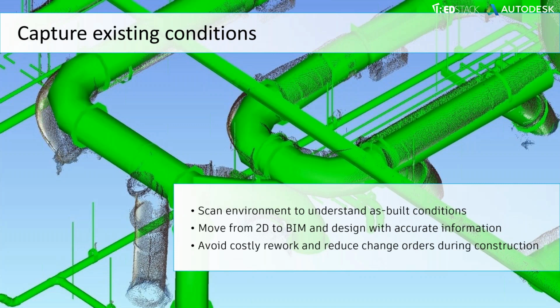And you can see there on the screen that we do have some pipe work that has been captured there, and also even reverse modeled as an as-built model. So that way, if we are adding cable trays or ductwork around that, we can easily find the clashes utilising Navisworks as well, obviously, before anything happens out on site, because you don't want to get stuck with a cable tray running through a pipe and then having to decide which discipline brings out the gas axe and has to cut bits and pieces to cut and shut parts of the project.